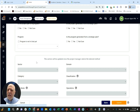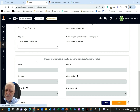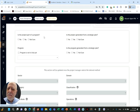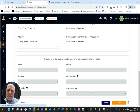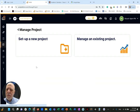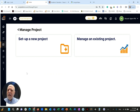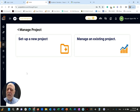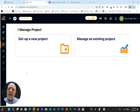This will become the project profile, which means we can change it in the future. Once we save it, the project stays on the profile of whoever entered the data — it will show on their project list. You can save it and come back later if you need to ask questions, for example whether the project is part of a program. Once you are ready, you submit. What submit does is send the project into what we call the future project list — we used to call that the parking lot. The project is set up in the platform but we have not agreed to start working on it yet. It stays there until the sponsor — who must have a senior manager classification in Uruk — goes in and activates the project.